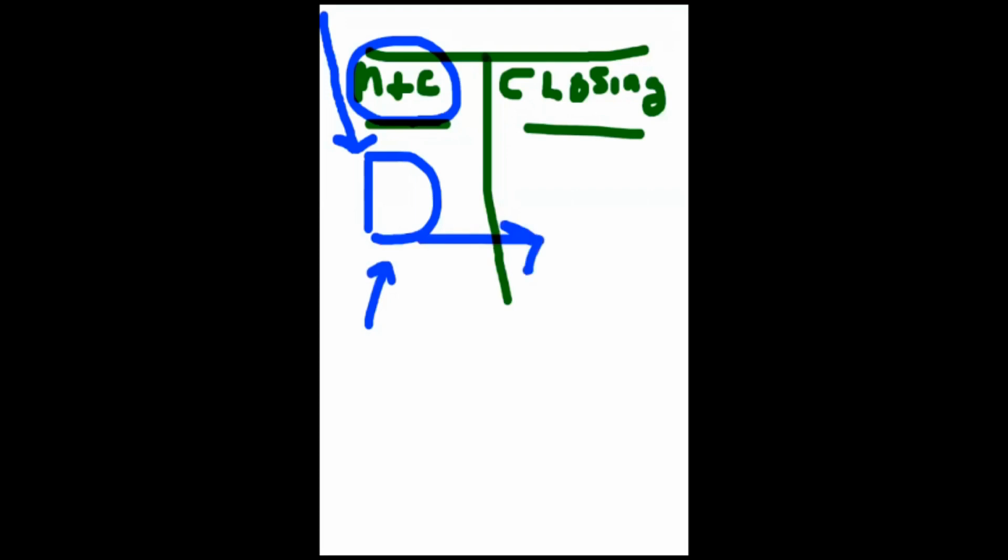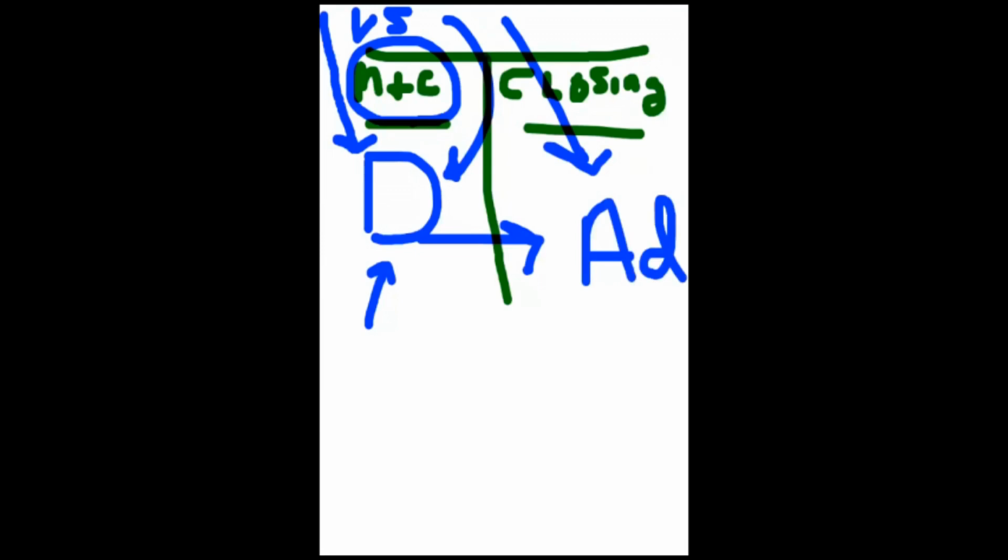Now, from the PMI standpoint, you should verify the work in monitoring and controlling and not in closing. In closing, you're basically walking into the room saying, hey, are we done? Pretty much. So there is no verification in closing. The closing process group is what we call administrative in nature. Here we're just saying, okay, this is what you said you were going to get, you got it, and we're good to go.